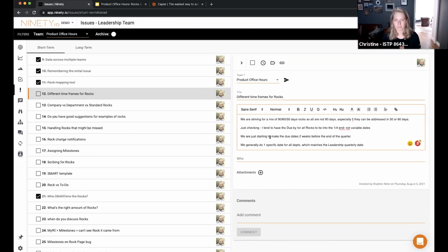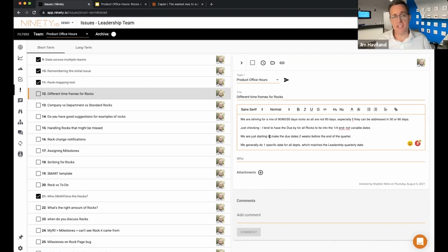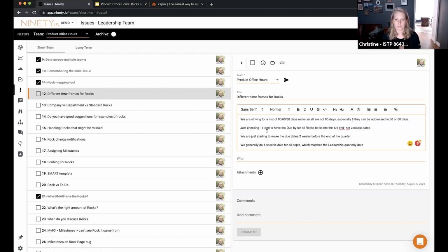Yeah. And you can set rock delivery dates to whatever you want. It's flexible enough to do that kind of thing. And I think the idea of setting your due date two weeks before your next quarterly is great. That way you're expecting it to be done, not having to wrap it up at the end of the quarter. So if that's what's working best for you, I say more power to you.